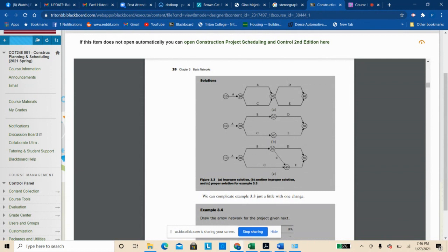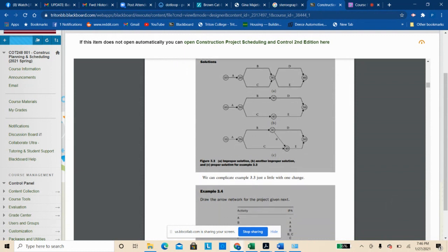You're just trying to differentiate your critical paths, and that's where we're going. I know there's a lot of logic games going on here, but there is a reason for it as we get farther and farther down in complicated stuff. So we look at option, what do they call them? Figure C, option C. That actually does provide a differentiated path by adding in, again, that dummy task.